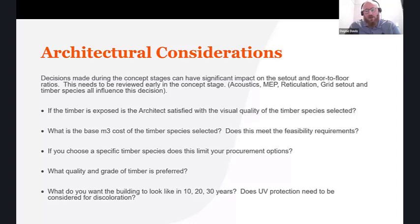And that's why it was so important to have the ECI contractor on board, because they're able to run a 2 or 3 stage tender on the project to get some real cost certainties, to weigh up the pros and cons, the risks associated with that. And at the end of the day, that's why we ended up with the producers that we have, because we're able to, I guess, have assurances that they're able to meet the cost expectations of the local market and the time frame required. But again, this can have an effect.